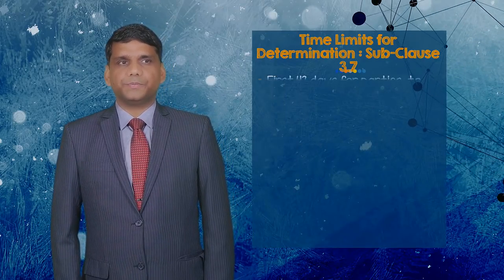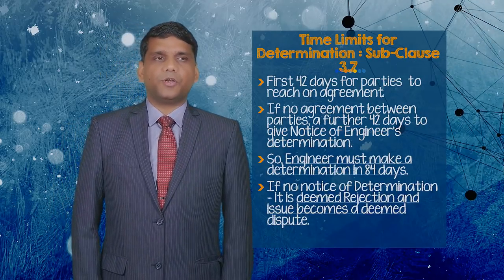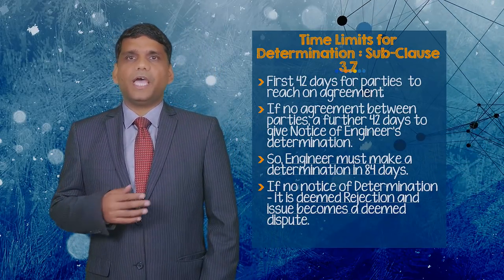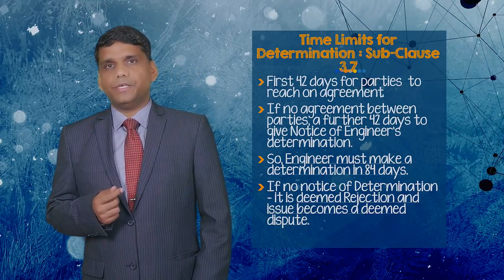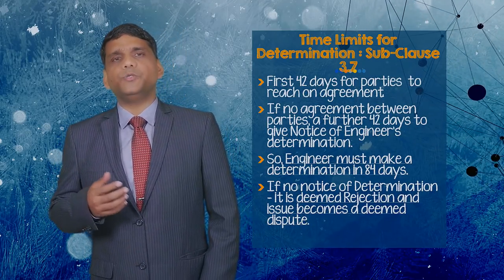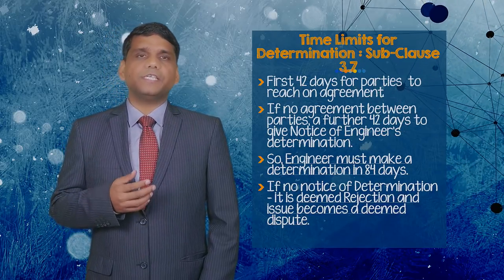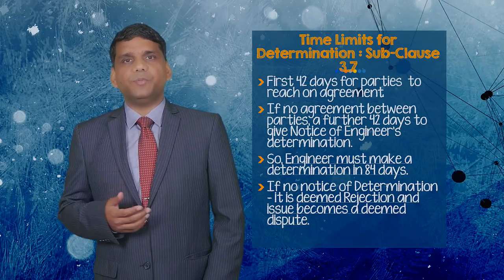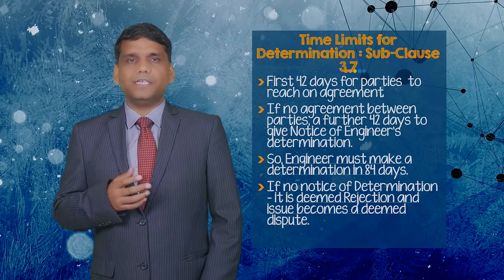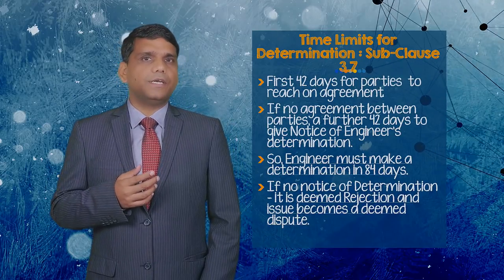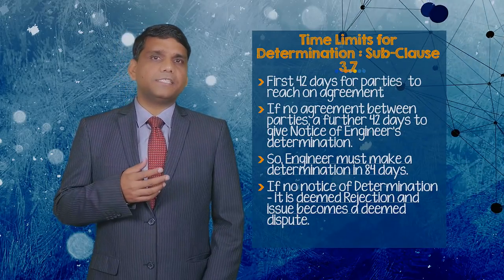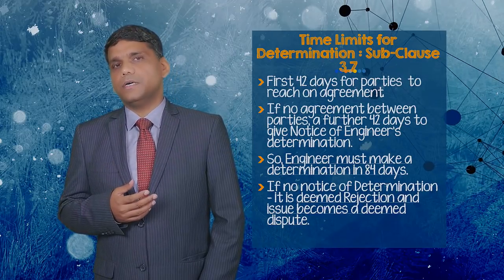Let us talk about time limits for determination under sub-clause 3.7. The engineer is required to act neutrally while making determination. The parties have the first 42 days to reach an agreement through consultation with the engineer jointly or separately. If the parties are unable to reach an agreement, the engineer has a further 42 days to make a determination and issue a notice. So in all practicality, the engineer has 84 days to make its determination. If no notice of determination is issued by the engineer, it is deemed a rejection and the issue becomes a deemed dispute.